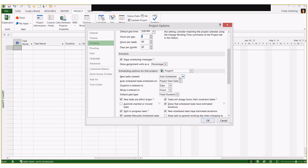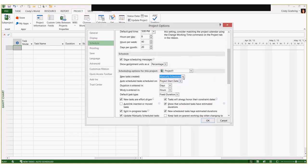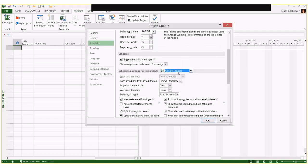As we scroll down, you'll see additional options. 'New tasks created: auto scheduled' — this is not the default in Microsoft Project. If you're using a version prior to 2010 you won't have this option. By default everything is set to manually scheduled. You want to change that right away, and when you change it, don't just change it for the project you're on — change it for all new projects and make sure they're set to auto-scheduled.